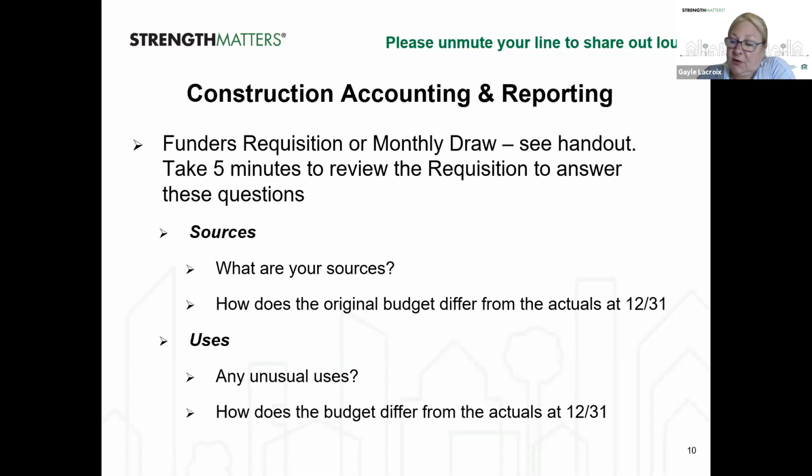And they will look at those invoices and review them and come back to you with questions about them before they fund you. Generally speaking, it goes pretty smoothly as long as you're on a timely basis and you agree to a timetable up front, which is really important to do. You'll get paid on a timely basis. And the reason that that's important is you want to make sure you're paying your contractors and they're paying their subs on a timely basis.